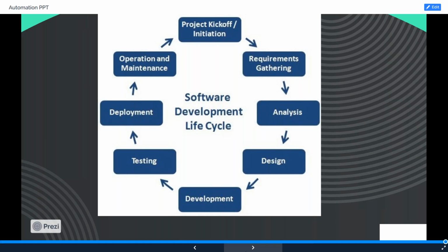In the analysis phase, they find the difference between the products or features that we have versus the features that the customer is expecting. If the delta is more, then we need to spend more time on this delta requirement. If the delta is less, then they will finish the work faster. It is always good to have a very stabilized base product for your organization, so that whenever the customer comes up with a new requirement or new changes, it's easy to do it. Clear?